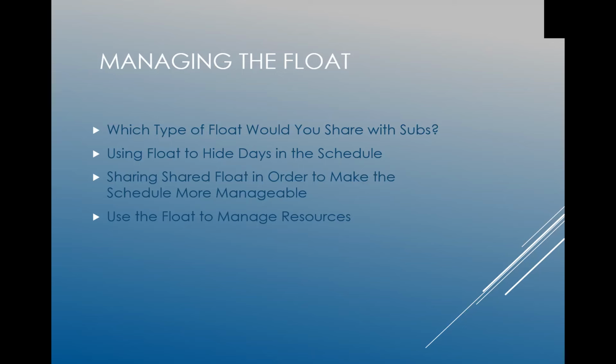Using float to hide days in the schedule? Absolutely. I used to have a manager, and I think we talked about this in class, that would always tell me to put in a fishing day. He would always say, oh, don't forget to schedule a day to go fishing. That was my float day. I would hide it in the schedule just in case I needed to make up extra time.